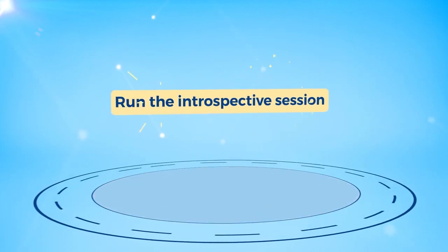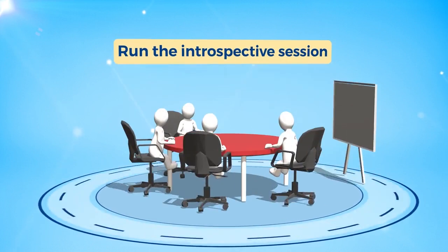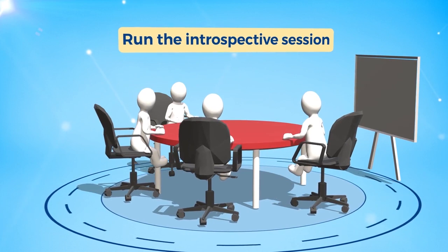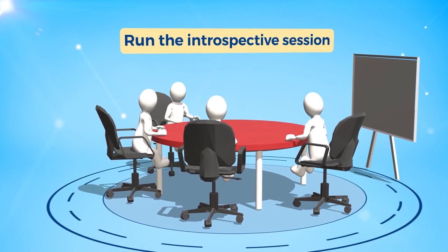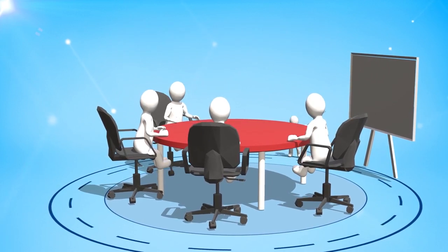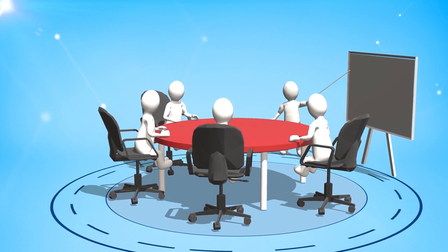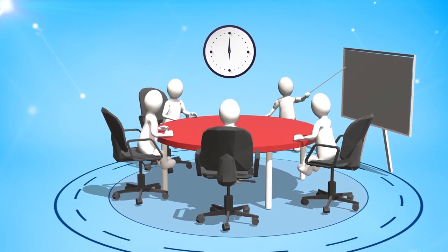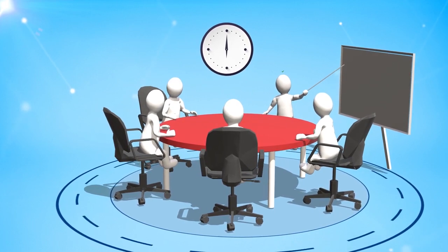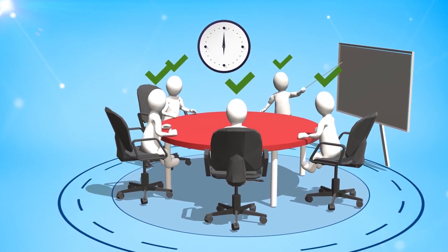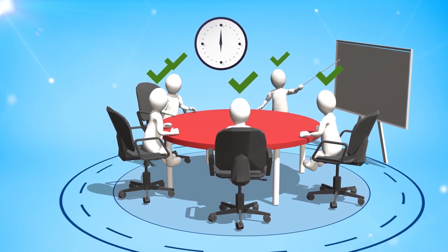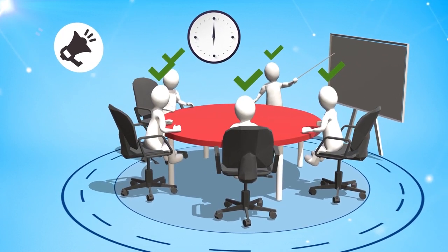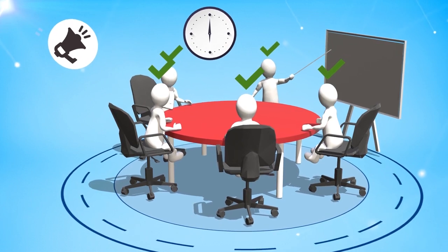Finally, the introspective session is run. This involves a discussion related to the findings and coming up with an implementation plan. An introspective session requires a trained facilitator and a note-taker. These sessions can take up to 3 hours. Upon completion, the prescribed changes are approved by stakeholders and implemented to return immediate results. Any successes resulting from the session are broadcast throughout the organization.